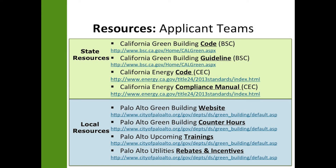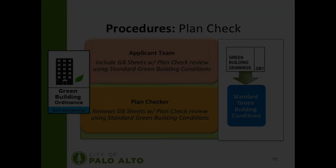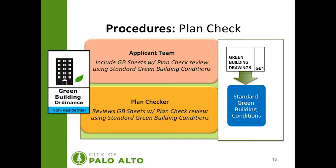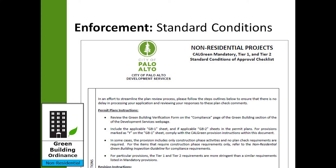This slide outlines resources for the applicant teams both at the state and local level. This slide outlines the procedures to prepare for your plan check. The applicant team will be required to include the GB sheets, review and complete them using the standard green building conditions found on the webpage. The plan checker will be responsible for reviewing the GB sheets within the plan check process using the standard green building conditions, so everybody's looking at the same document. This is an example of the standard conditions for non-residential projects — it's a very detailed conditions document that outlines the requirements.